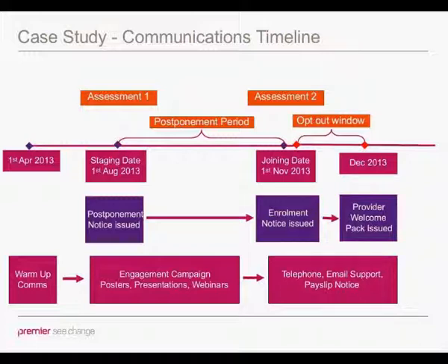I think it's crucial that you have a separate communications part in your project plan. I think it's a vital part of this. And even if you're in the situation where you want to do the minimum amount of communication, the regulations are such that you have to do certain things, and that is going to confuse your employees and you're going to get questions. So I think the communications element of this project is as important as all the other ones, really.